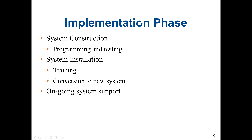In the implementation phase, we use a computer programming language to construct or develop the system and do the testing. We have different types of testing. We also do the system installation after construction of the system. We train the users of the system and handle conversion to the new system. Then there should be ongoing system support, for example maintenance or developing a new version of the system to improve it.